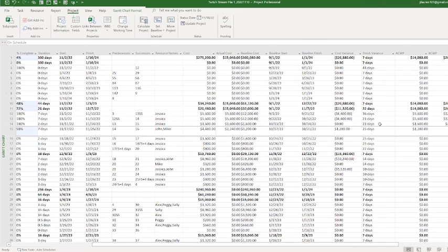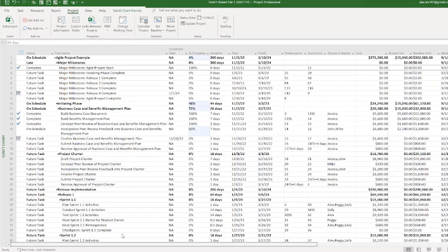So as you can see, we don't have a minus date in anything here. Okay, so this is why we've got 20.5 day variance. And as you see, we got all these variance days. So look, 44 days, and then everything else has been shifted to 7, as you can see, which means we're already late, and that's not good.